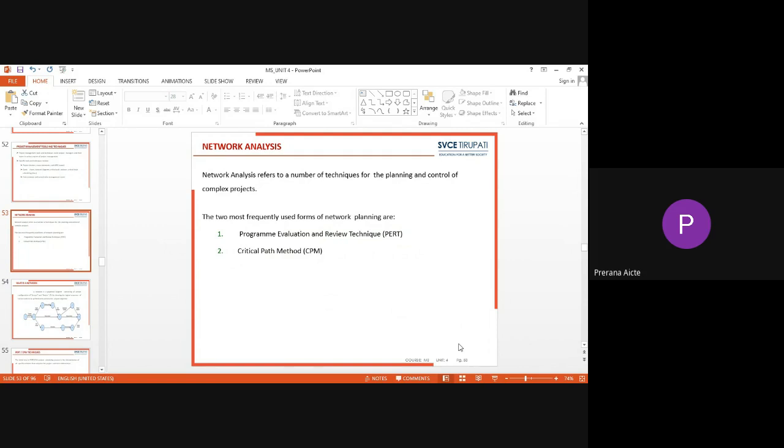And coming to the critical path method, it is generally based on earlier data, the data which is already present from the past. That data is considered for the activity durations, and based on that data, once the network is constructed, we try to analyze or find the total expected time duration for the complete project.